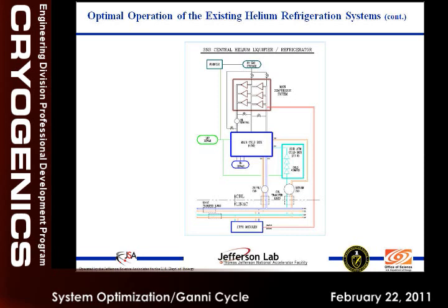And even the pipes that went from the panels to those heat exchangers were not looked at closely, and those straws limited the whole plant. Instead of 7 or 8 kilowatts at 4K, we got 3.5 kilowatts. I think about it every day. But these things happen, and a lot of people won't talk about it. I want to bring it up and tell you how much you have to pay attention to. All those 6 modes that we specified at CHL2 were not specified at CHL1, because it was written by the same people who were in control, and they never understood all the things that need to be addressed.